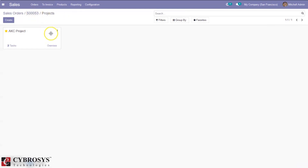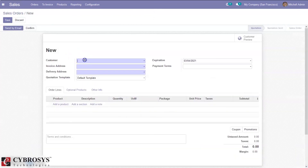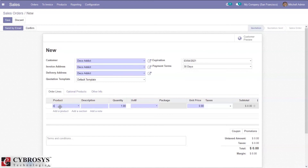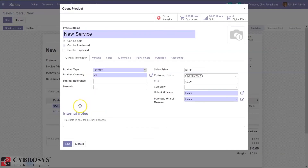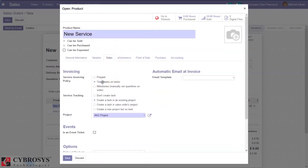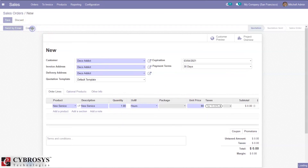Now let's come back to sale orders and create another sale order. Select the same product 'New Service', and change the invoicing policy to timesheet on task — this time we are going to create an invoice based on the timesheet of the employee. Save this and set the unit price to 80, then confirm the sale order.